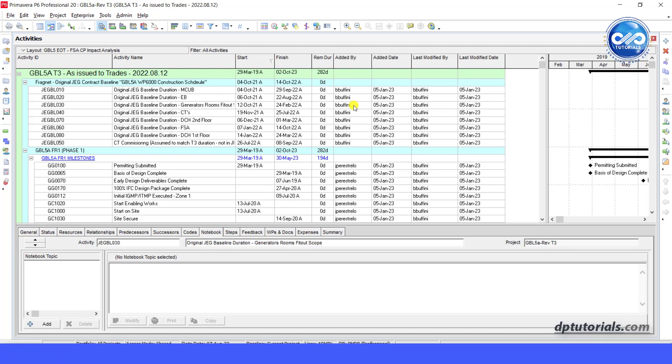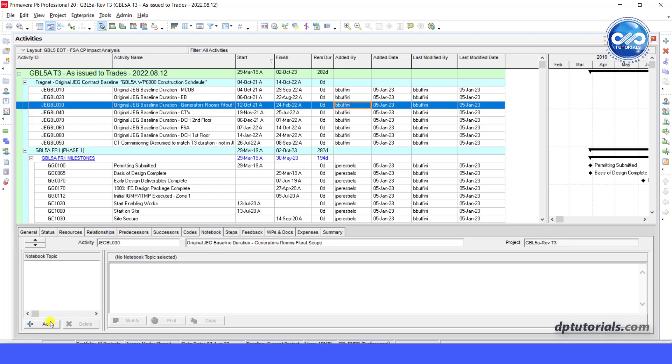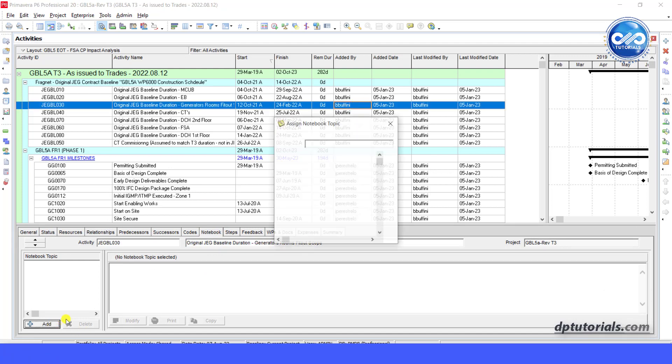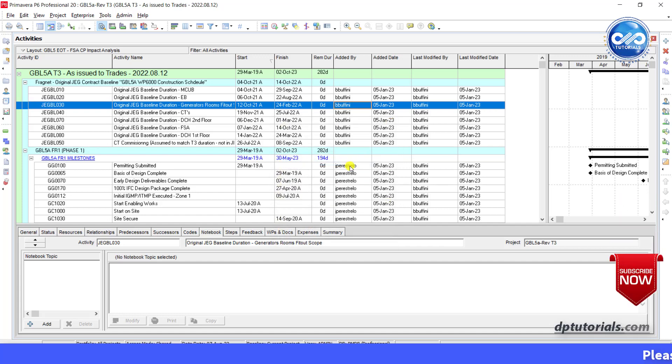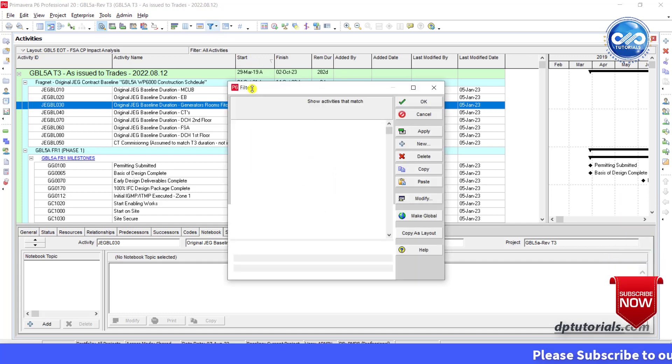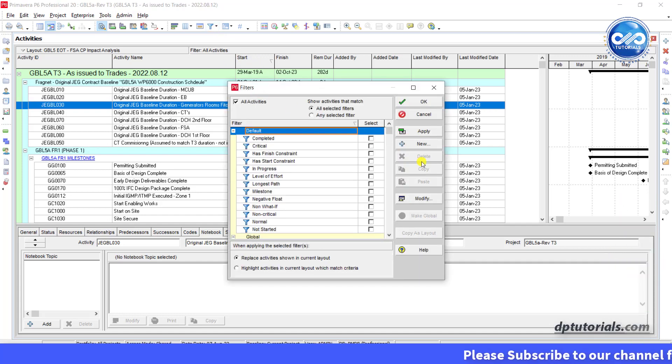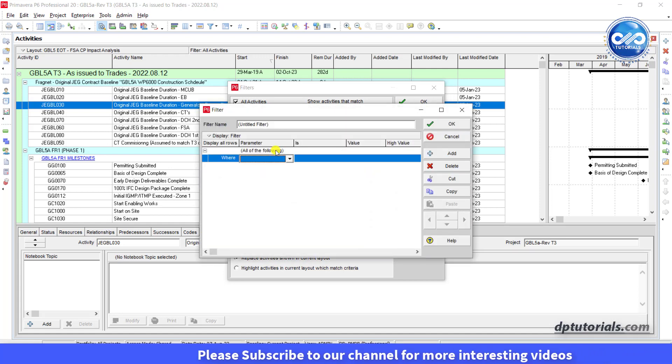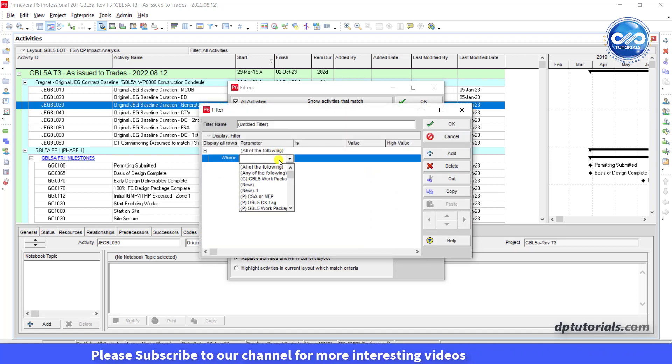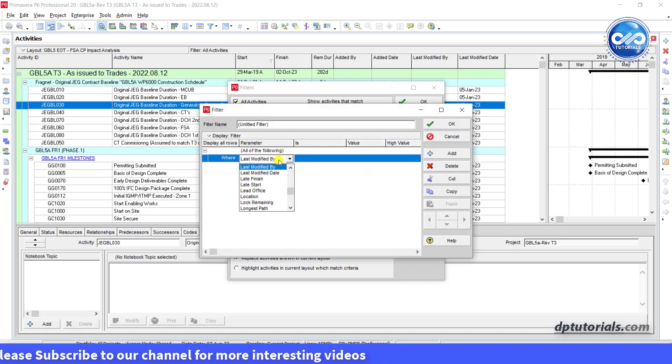If you feel that there are many wrong changes that have been made and if you wish to publish an exception report, you can also filter the activities by the last modified person with the deviations that you would like to highlight.